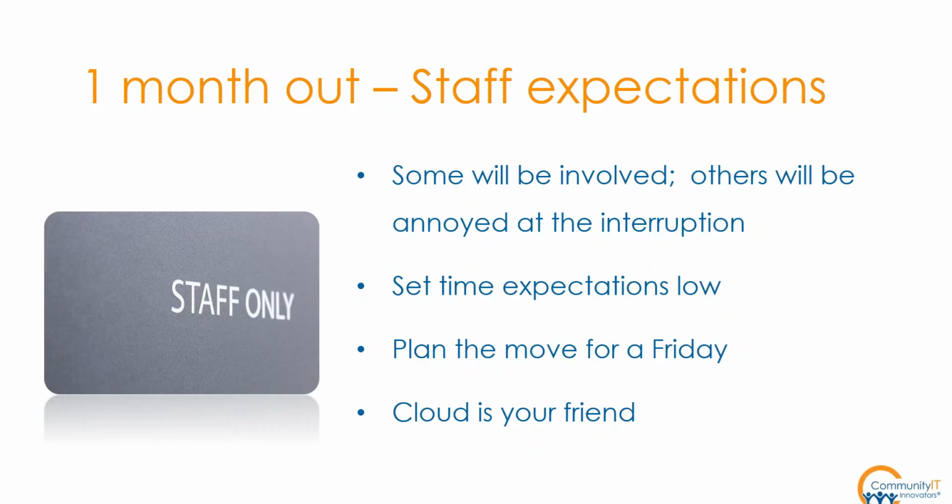Yeah, so you want to tell everybody network's going down Thursday night, and don't expect it to be back up till Monday morning. That way, even if you plan to do the whole move on a Friday, you still have all weekend to deal with any mess ups. Any issues that may come up, your fault or not. Yep. Yeah, because there's a lot of vendors to coordinate, and if you need the extra time, you've got it.